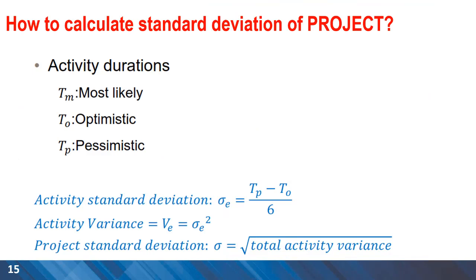The standard deviation of the project has been used in our calculations, but how is it calculated? For each activity, we have the most likely, optimistic, and pessimistic times. We can calculate the activity standard deviation as the difference between pessimistic and optimistic time divided by 6. The variance is the standard deviation squared, and then we can calculate the total variance for all activities in the project — the square root of this total gives us the project standard deviation.